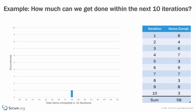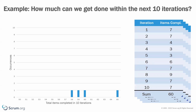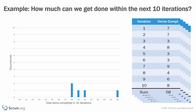Now let's visualize this. On this chart, the x-axis shows the sum we got from this simulation, which is 58, and on the y-axis it shows the occurrences. In this example, we can see how many simulations resulted in a sum of 58 — so far only one. We run another simulation and this time it results in a sum of 59, so it shows one record of 59 on the chart. We repeat this numerous times. For example, another simulation resulted in 58, and therefore the bar now increases to show two occurrences.